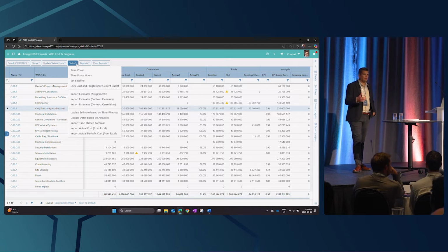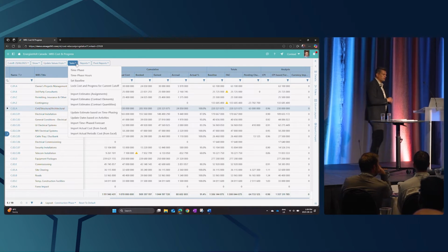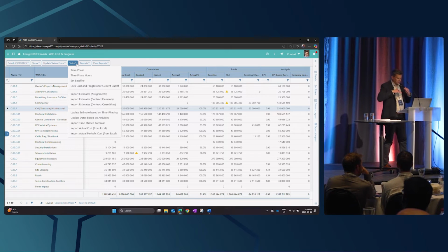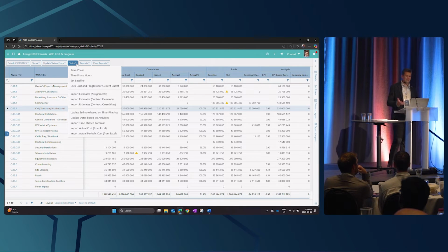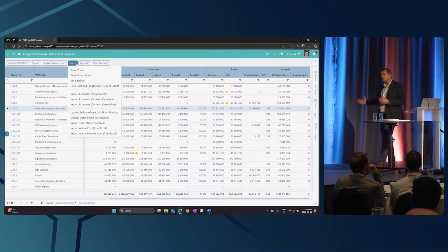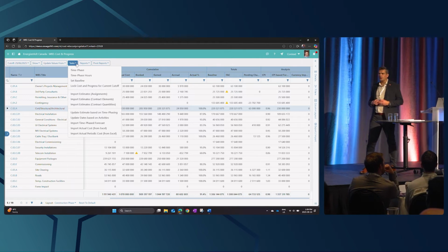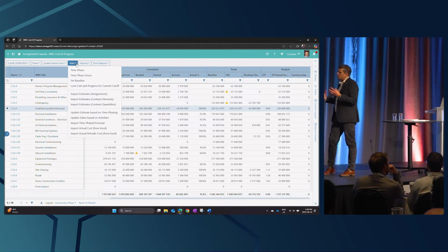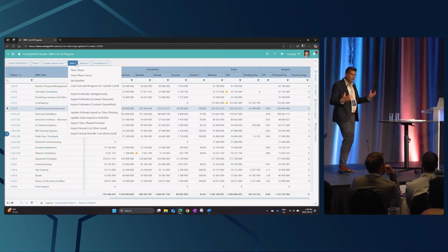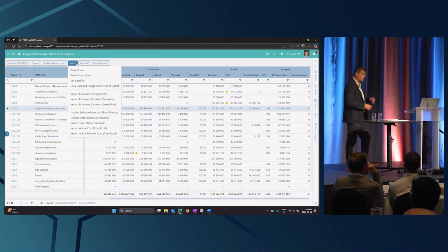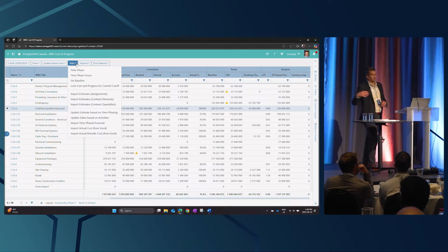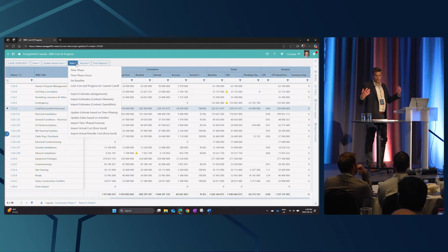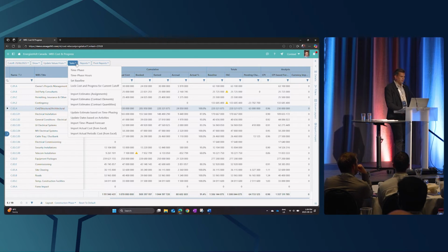So you get your schedule in there, resource loaded, and you can just apply that on your projects to get the same distribution. Update actuals, update from bill of quantity if you're using contractor reporting, update from LEMS. So everything here is tied in. That's why we're configuring for you. Or you use bill of quantities, or you're going to be using LEMS reporting, or you're going to use other methods and so forth. So those are all set up.